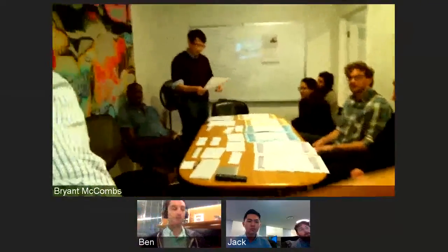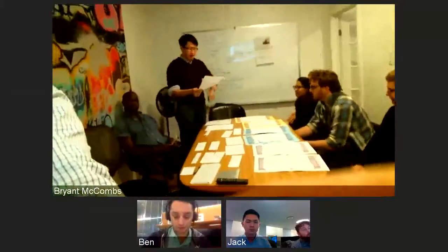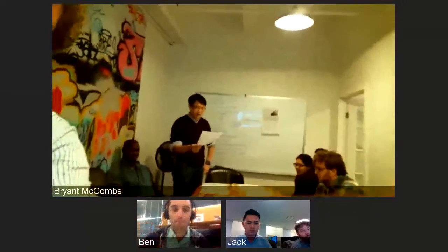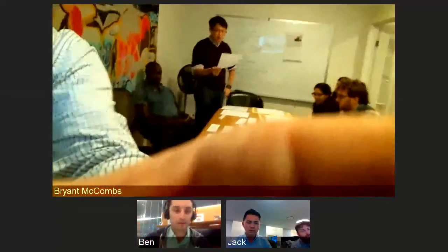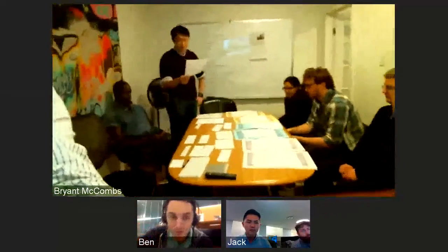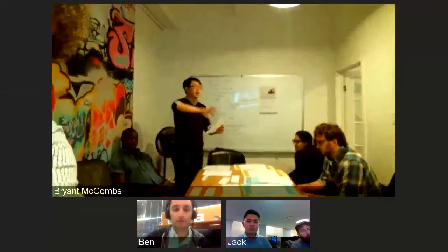For example, "Kathleen can view a budget spreadsheet" is the title of the card. "Allow Kathleen to access a page of budget data. The page contains preset categories and budget ranges. An additional column allows a recording of total amounts spent for each category to date. See team design for mockups and categories." Pretty simple, pretty standard story card. Has a title, has a body, has a pointer towards more information.